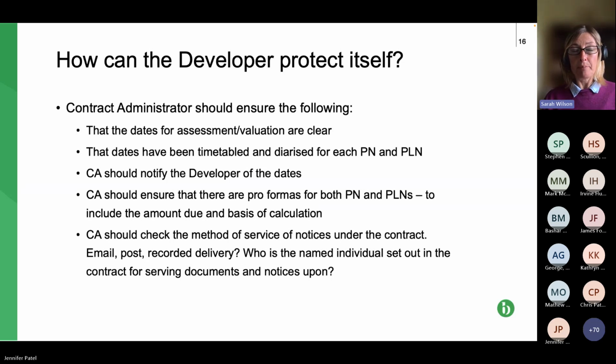You don't, as a project manager, want to get into a situation where the paying party is saying, oh, well, I'm not happy with what you've certified, I don't want to pay it, because that's not a ground for not paying. Have pro formas, payment notice and pay less notice, to hand, so that the whole process hopefully runs seamlessly, because, as we said at the start, this is a risk area for the paying party and project manager, contract administrator.